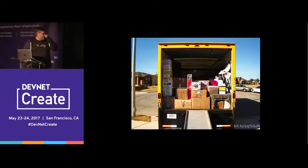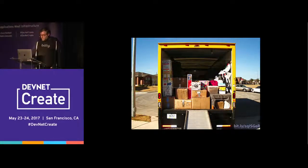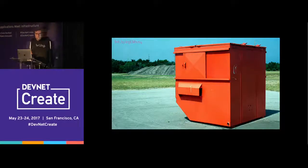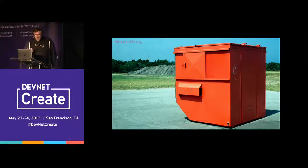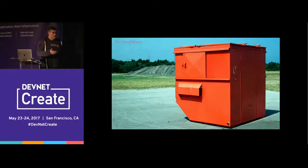So you've got all the due diligence out of the way, you've been honest with yourself and your vendors, you're focusing on your priorities — it's time to pull up the truck and start moving. And then you realize maybe not everything needs to come along with you. Just like when you're moving apartments, a lot of times the easiest way to move stuff is to throw stuff out. If your company's been around a while — Bitly's been around eight, nine years — there are things you built that didn't pan out, that you've been meaning to kill. Strongly recommend you look at what you can shut down instead of moving across data centers. It's way easier to spin something down and clean it up than to move it to a new environment.